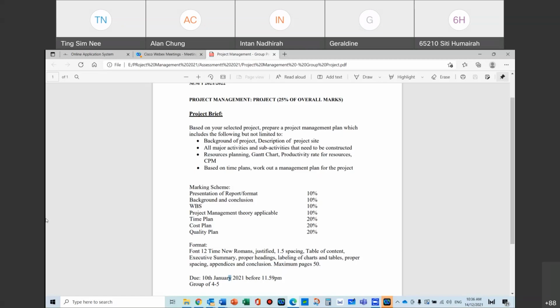It's definitely comprised of ownership, meaning you buy that machine and it's going to depreciate over the next so many years. So per year, this is the cost of owning that machine. After 6, 7 years, you definitely have to have some form of replacement or maintenance and all that. So you need to show us that this 450 is based on ownership plus maintenance plus servicing, and then you come up with that rate.